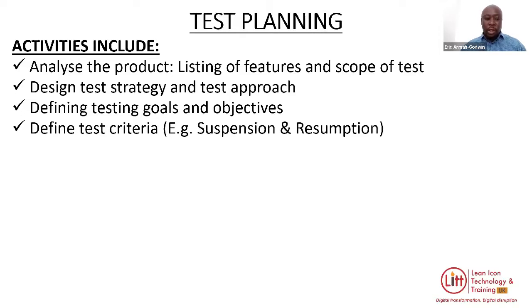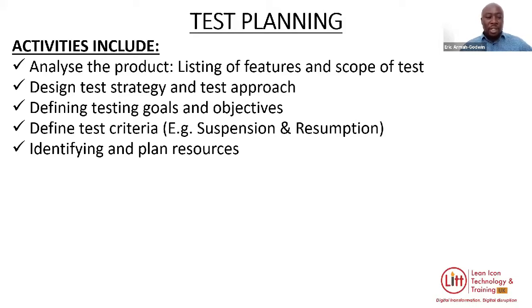And when testing resumes again, you want to define which steps to take. At this stage as well, we also identify and plan resources. Who's testing? What caliber of testers do you need? Do you need automation testers, just manual testers? Are you going to involve test managers? Who are the key types of testing resources that you need?